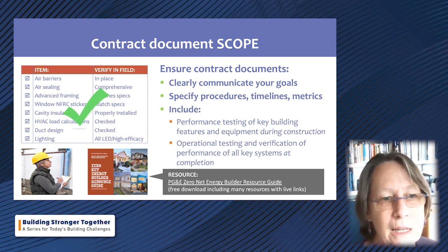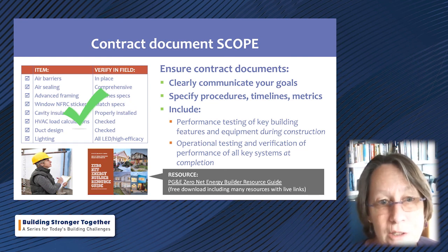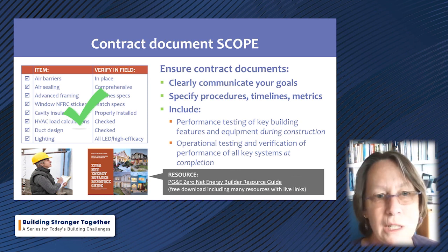And then covering some of the key points, performance testing during construction, all that. If you want it done, it better be in your CDs. If you want verification done, it better be in your CDs. So not just the how to build it, but how to make sure it's actually working.